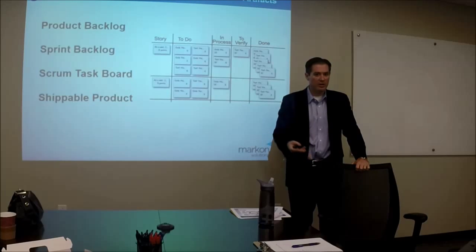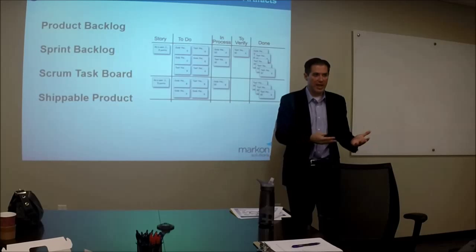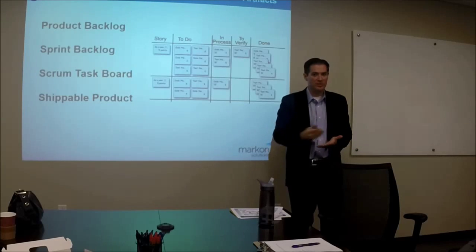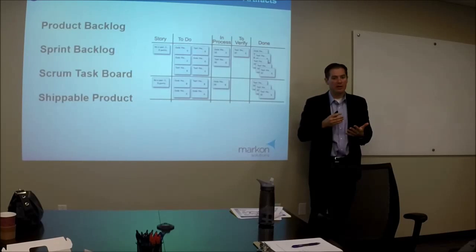Meet with the product owner. Say to the product owner, hey, you want a new feature. This seems to be really important to you. You're saying you want us to stop everything and add this feature to this sprint. We're going to let you know the impact of that. We might not be able to get these other stories done. Is that going to be okay with you?